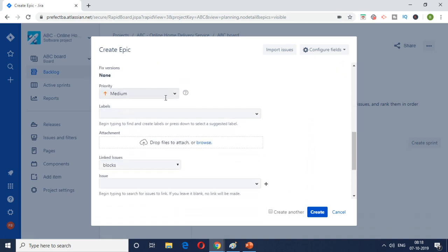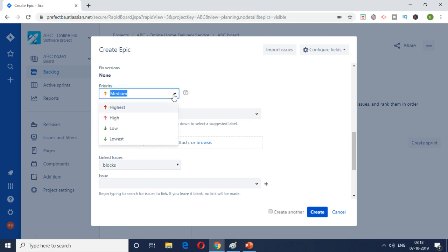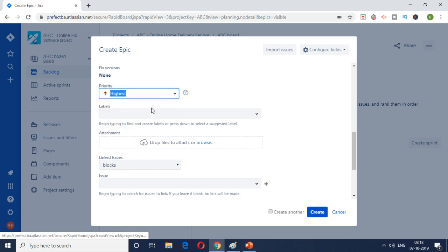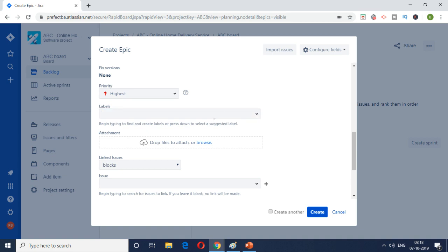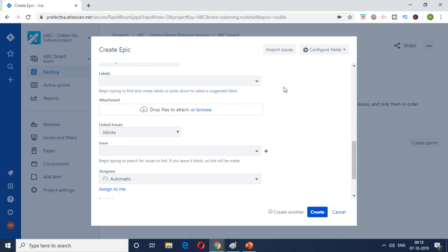And then the priority. The priority is highest. If you see without browsing or searching there's nothing the customer can do. So just keep it highest. And then labels, I'm going to ignore it at the moment. The labels are used to kind of group the epics and stories together. But I don't see the need for now. So I'll leave it there.